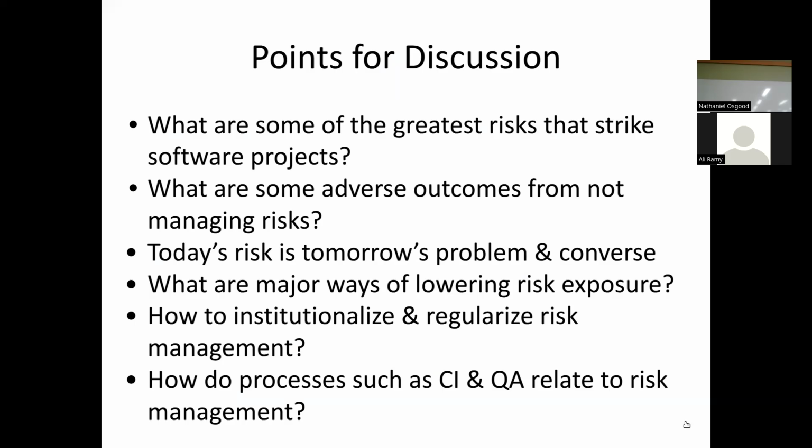And so they started to elaborate the system and think about all the different ways it can be more flexible for the military. And well, you may not anticipate what happened. It became such a grand vision that they didn't even deliver on the basics, and it ended up delivering almost no value because it just kept on piling on the feature set. It was scope creep, but in a way that was elaborating in their own minds its potential prematurely.